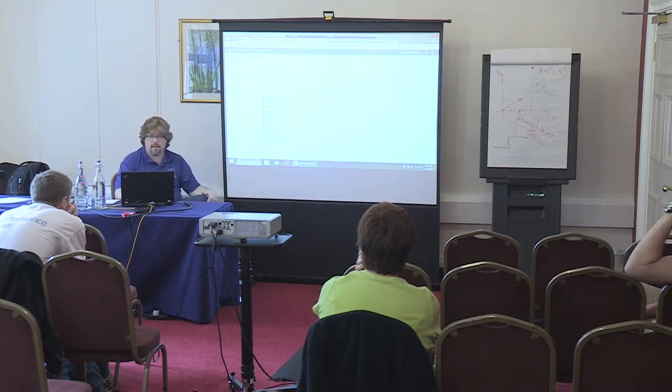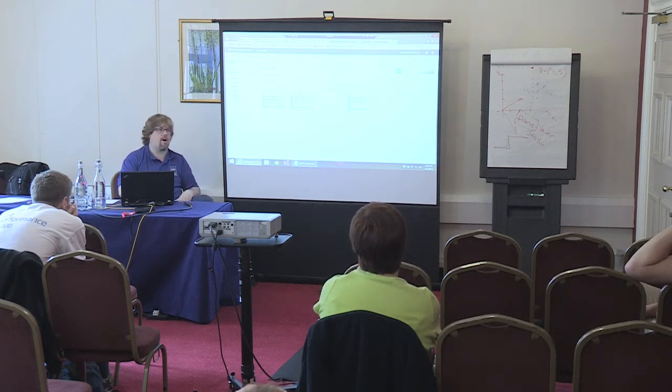And what I can do is on this first one, I can say, you know what? This is approved, and this is committed. And you see these numbers up here, and what happens is when you cross the threshold here, your work in process limit, it'll turn red to indicate that you're taking on more work than you should.